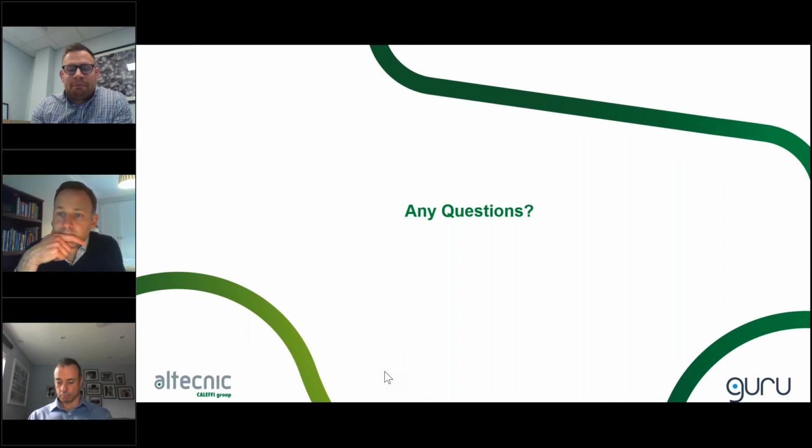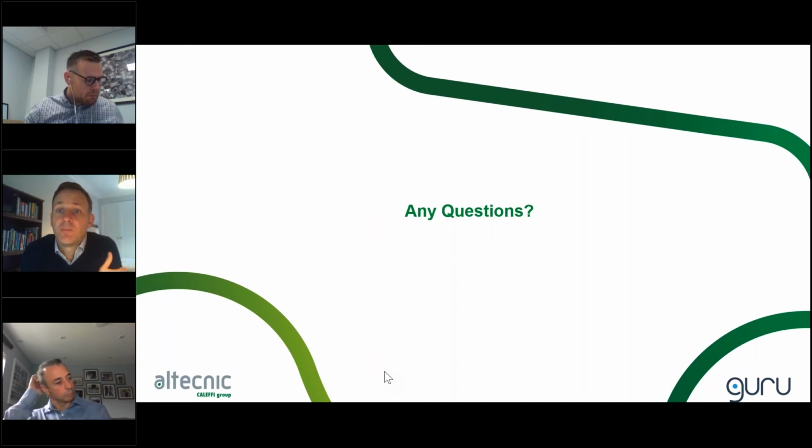Great, thank you. And then just one more follow-up question there would be, who typically would have access to this remote information? So it depends on the stage of the project. We've got projects on the go now where it will be at commissioning stage, and the key stakeholders there will be the M&E subcontractor, Altecnic, for example, as the HIU provider, and it might be the main contractor as well. In operation, it's more likely to be locked down to the operator, who should then have the ability to extend access to the stakeholders that are appropriate at whatever moment that might be. So it might be the O&M subcontractor, for example, may also get access.